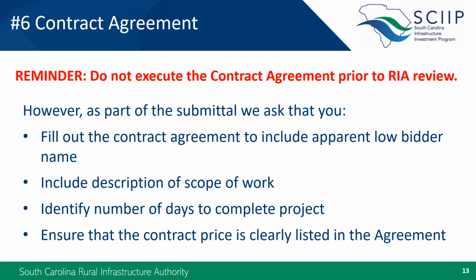We recommend either revising this section to a 30-day processing time or changing the language to read that a payment will become due 10 days after the pay application has been processed by the grantee/owner and the funding agency, which in this case is RIA.